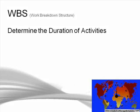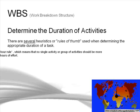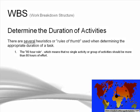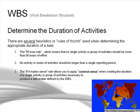Determine the duration of activities. There are several heuristics or rules of thumb which can be used to determine the appropriate duration of a task: the 8/80 rule, meaning no single activity or group of activities should be more than 80 hours of effort; no activity or series of activities should be longer than a single reporting period; or the 'if it makes sense' rule, which allows you to apply common sense when creating the duration of activities necessary to produce a deliverable defined by the WBS.